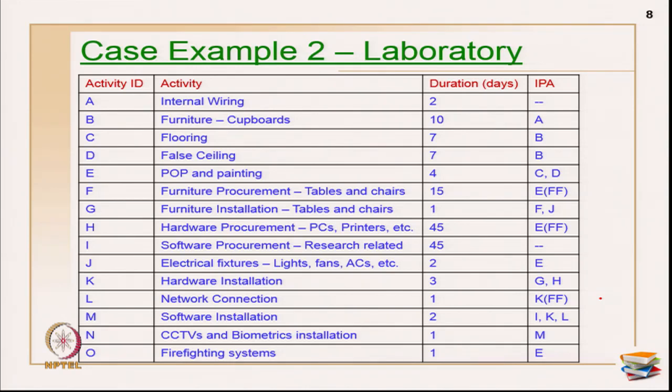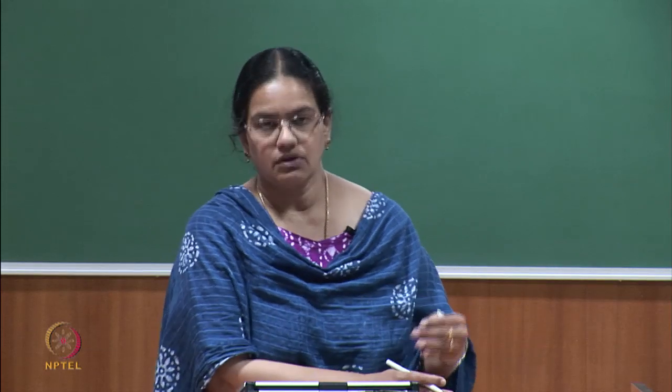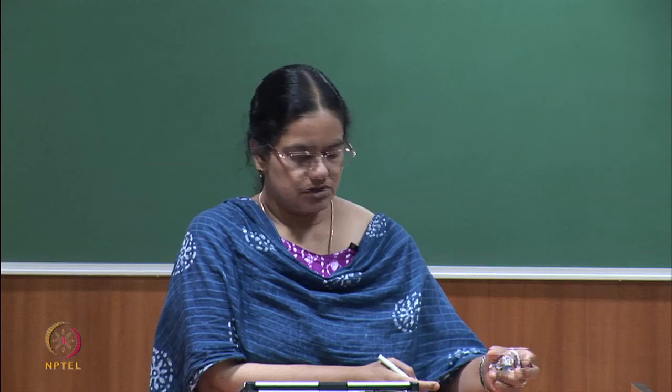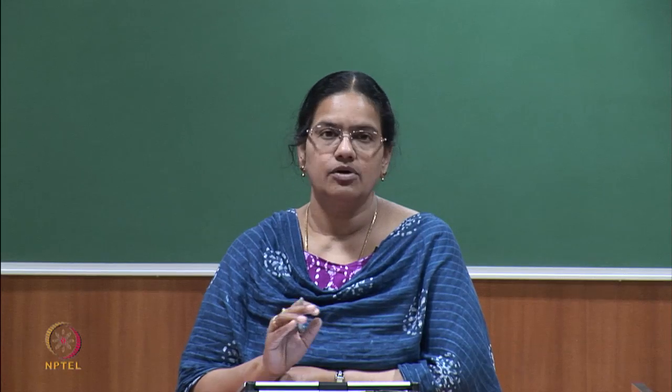So that's how the relationships start filling up after you make all the decisions on the activities. Let me go a little backwards. The logic is, first you go with the levels, breaking down the project. As and when you start breaking down and moving ahead, you get more and more information on the assumptions, what has to be done, and the real scope of the work on each activity gets defined, and then you go on in the levels. At one stage all decisions on all of the items would have been done, then the network schedule is generally prepared. This is primarily done after the laboratory setting up is complete.